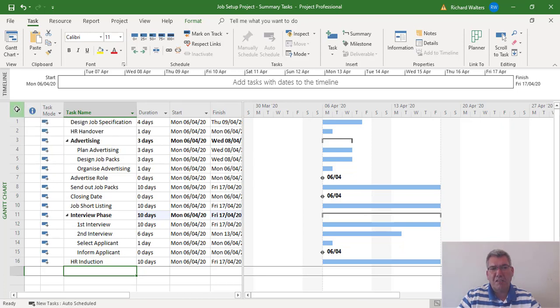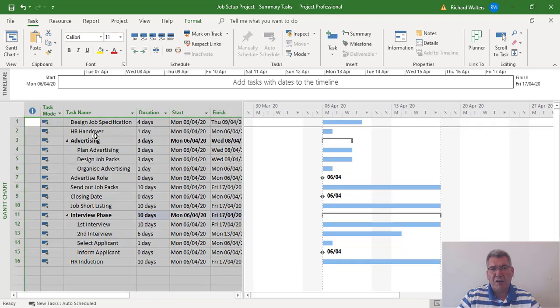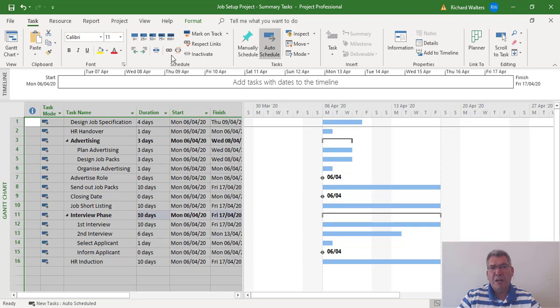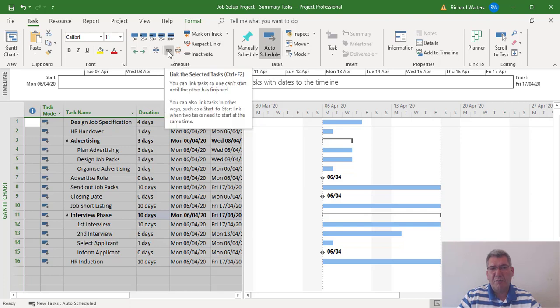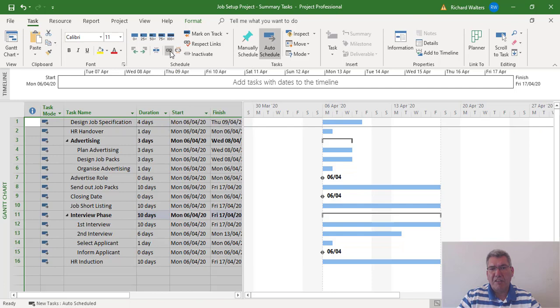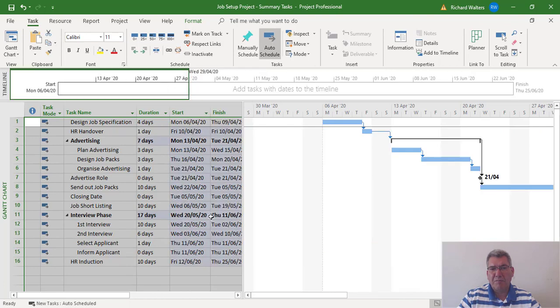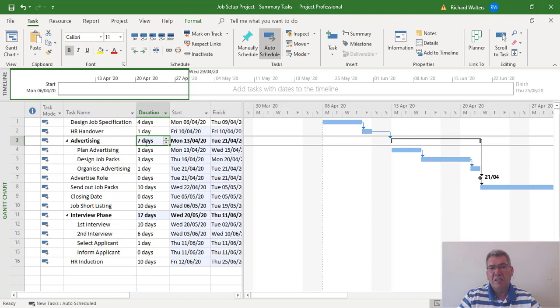linking all the tasks together. To do this, I'm going to highlight the whole table area in Project. I'm just going to click on the chain to link everything together. Now we can see that advertising is now changed to seven days—three plus three plus one—and the interview phase is now updated to 17 days,